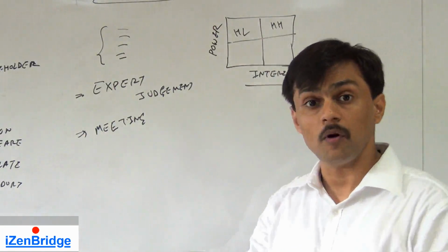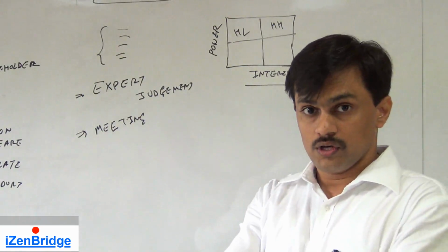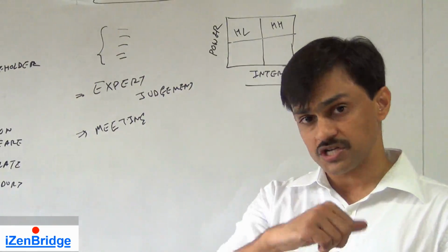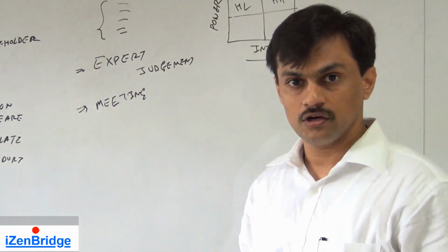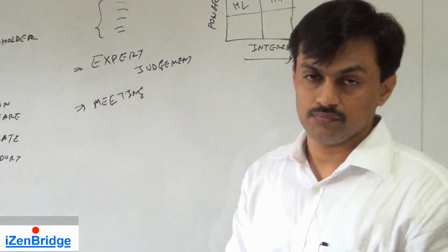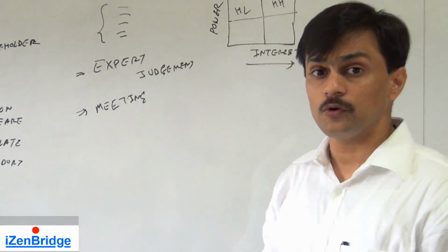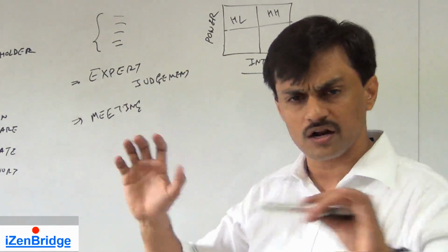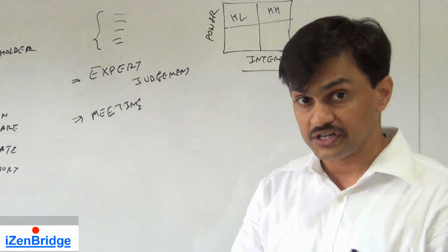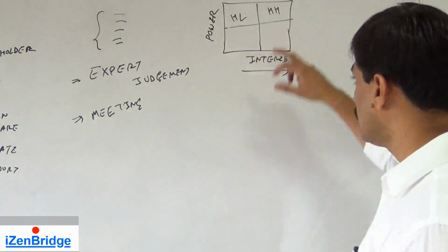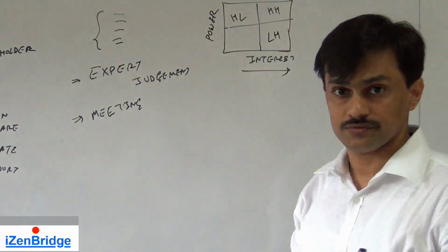The sponsor, the person who is awarding a project to you. He is the one who is spending money for this particular project. So if he feels that things are not going good, he can just scrap the project. So the project initiator group, depending upon your organization structure, PMO may fall here also. Portfolio people can also fall here. The people who are very influential for your project future, and they are also interested in the success and failure of your project. The people who are not powerful but high interest.